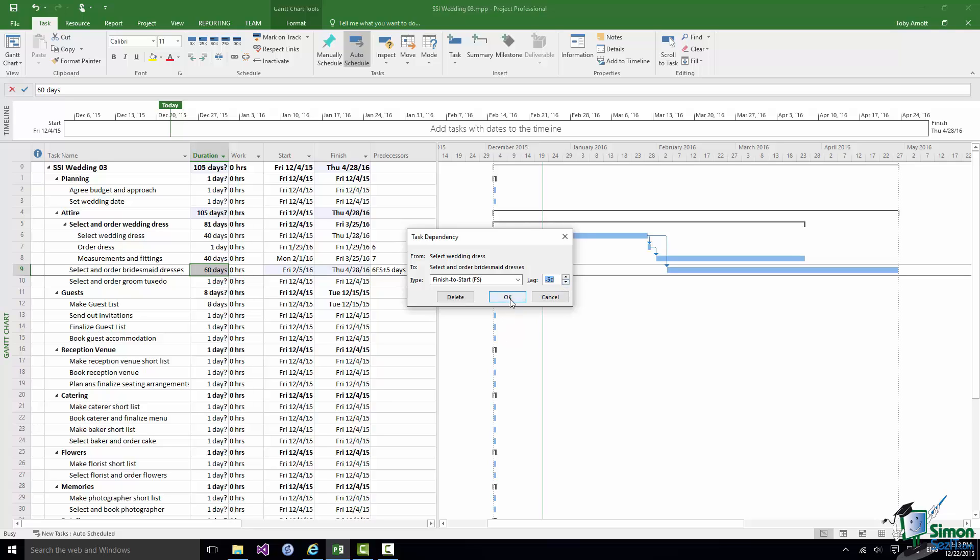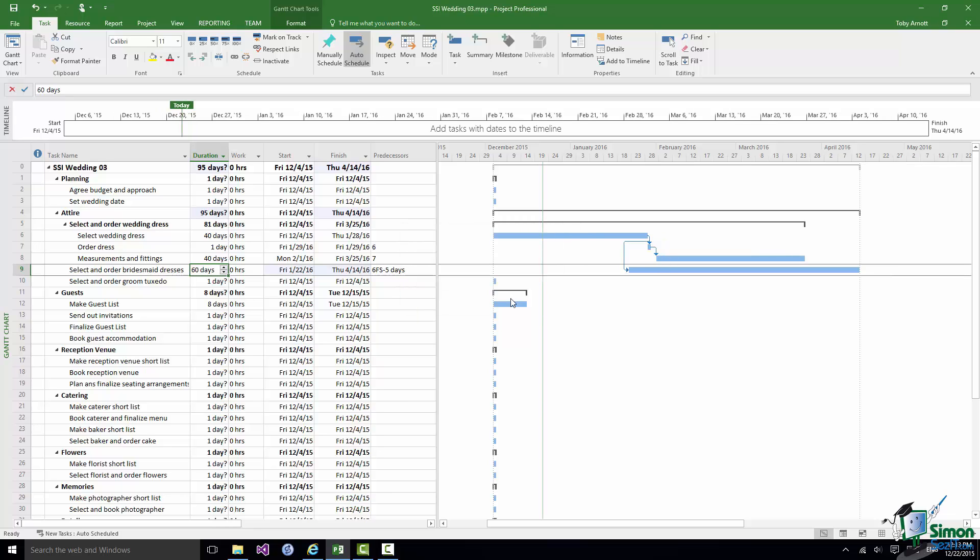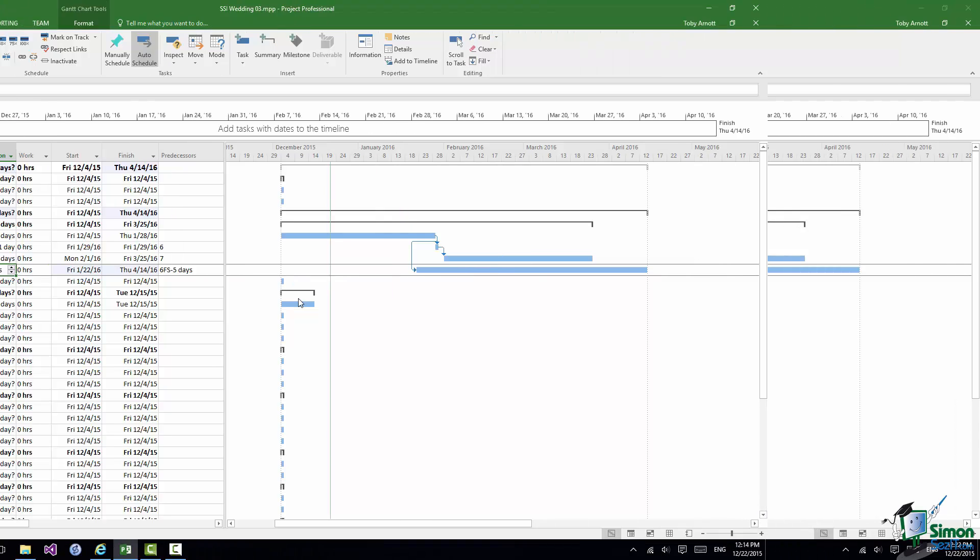We still have a Finish to Start relationship but what the relationship now says is that the second task can start five days before the first task finishes. So we can actually get started on selecting and ordering the Bridesmaid Dresses five days before we finish selecting the wedding dress.